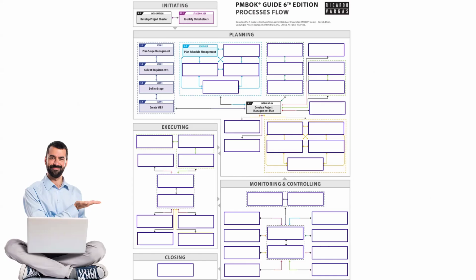So I would define the scope in two manners. First of all, I'll translate the requirements into a product scope, what is to be created. And once the product scope has been established and agreed, then I will translate that into project scope. That means the work required to be done to complete the product scope. So product scope and project scope are different. Product scope is what to produce, and project scope is how to produce. These two things are very important elements of your scope statement.